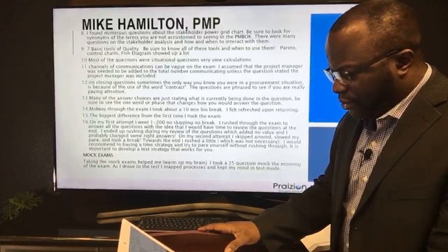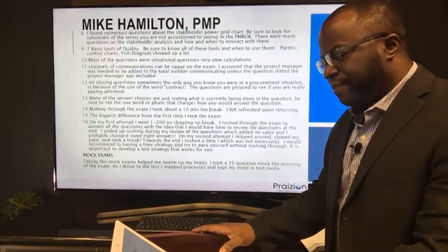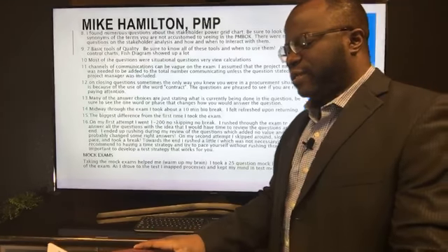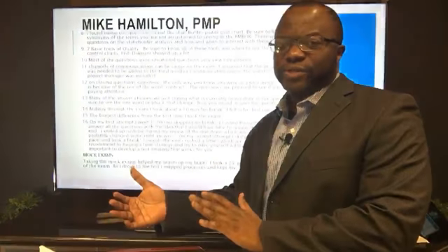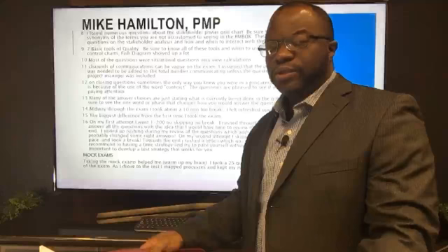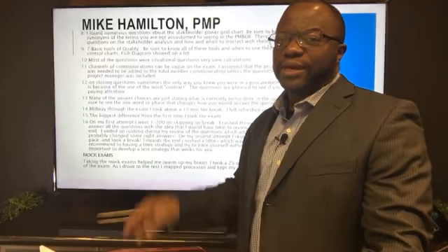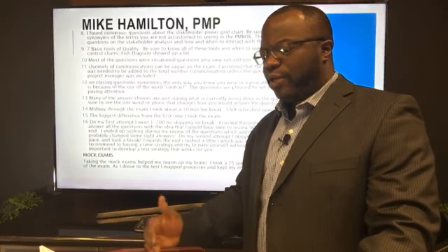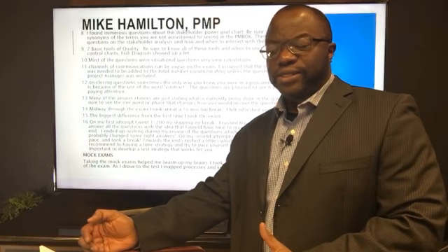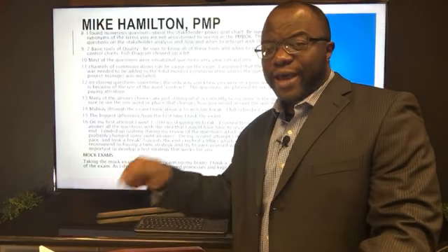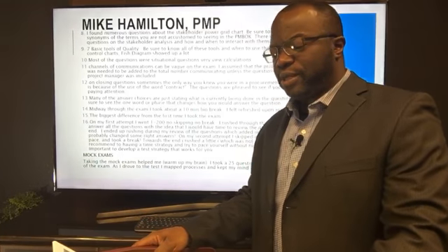Namdio says, any clues as to when to include PM? Yeah. So if you get a question that says, on a project there are X number of stakeholders, you probably just have to go with the PM being in that number. But if you get the question, there is a PM with a team of XYZ, then you have to add the PM because the PM isn't included.